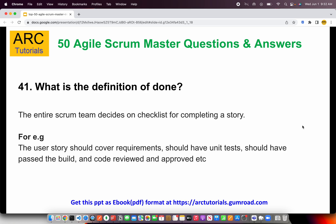The first question from Part 5 is: what is the definition of done? This is a very subjective question. The way you should answer is that the entire scrum team decides on a checklist for completing a story.